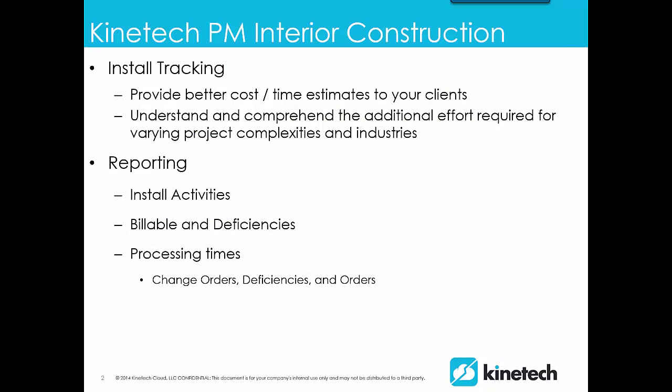As I'm sure you guys are aware by now, labor costs are one of the greatest costs on any dirt project. So regardless if you're using an internal install team or a third-party install team, by being able to track the actual time for each supervisor, tech, and labor on the job site for each install activity being done, this will then help you forecast better, potentially reward productive teams, and hold less productive ones more accountable.